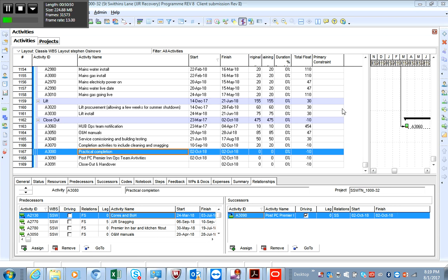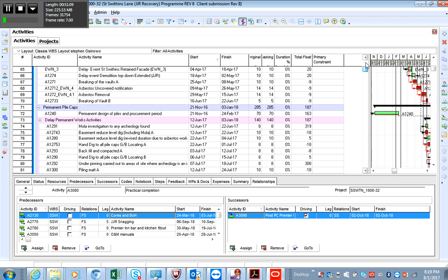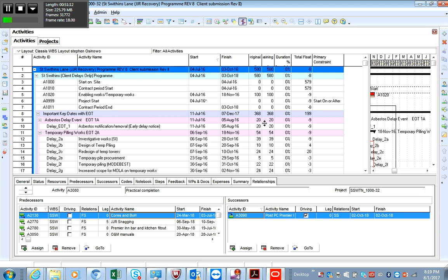Clearly is late because you've pulled out the total float values and it's minus 10. So you already can see that you're performing a health check on the program and you can clearly see that it's out of sequence. So this would obviously tell you that in terms of delivery of this project is in trouble. Yes or no? How do we then recover the time?